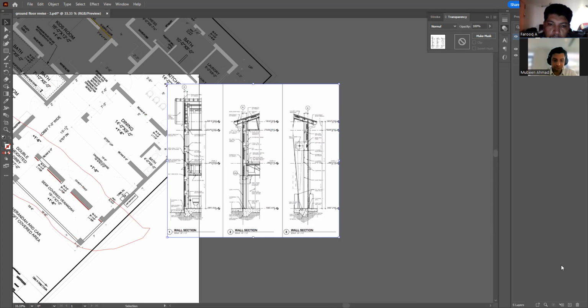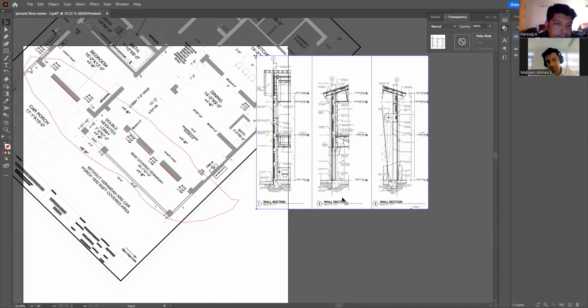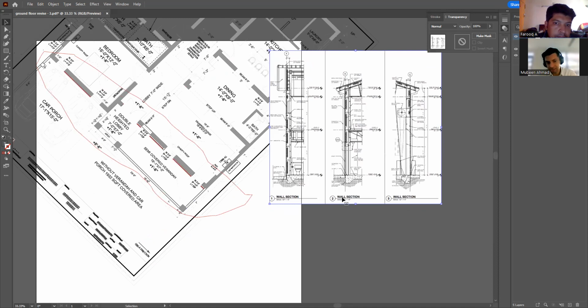And with regards to your question about what I meant by materials, materials will be specified here on this wall. It will say exactly where the wood part is going to be, where the gutka part is going to be, where the glass is going to be. Everything will be very clearly laid out onto this one, so you will not have any problem. Using that, we will also be able to calculate the amount of material actually needed. How much tile do you really need? How much window glass do you really need? All of them. It's a very step-by-step process that we need to go through, but we need to do things the right way. Okay.